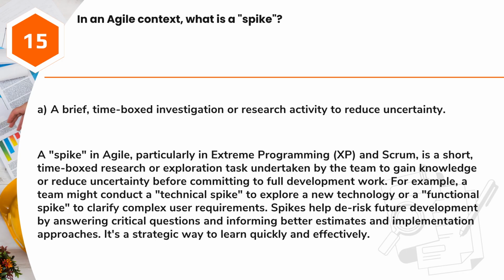For example, a team might conduct a technical spike to explore a new technology or a functional spike to clarify complex user requirements. Spikes help de-risk future development by answering critical questions and informing better estimates and implementation approaches. It's a strategic way to learn quickly and effectively.